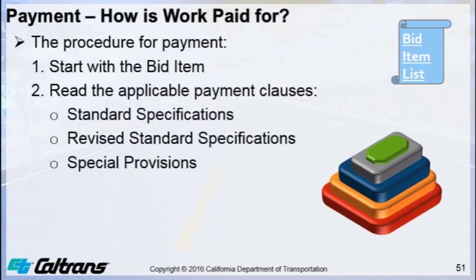Understand that the applicable specifications, payment clauses, start with the standard specifications, any revised standard specifications, and any clauses in the special provisions that modify payment.